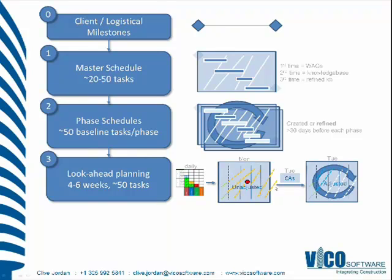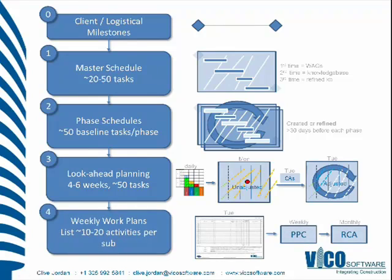Then we have the unadjusted forecast. Based on our completions, we can see deviation from the original target and an extension to the overall period in the look-ahead plan. We can also see forecasting warnings showing disruption in tasks that require control actions. Through the look-ahead process, we use the forecast plus control actions to adjust and show where we hope to maintain production without conflicts. That adjusted forecast is then used to create the weekly work plans.